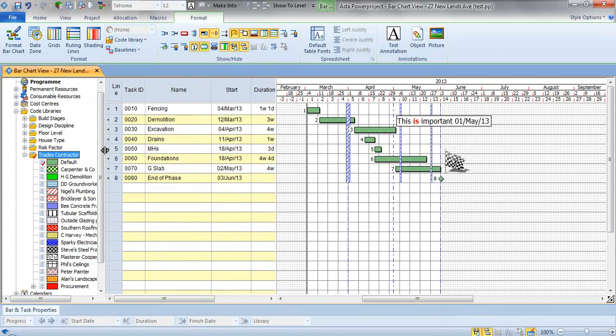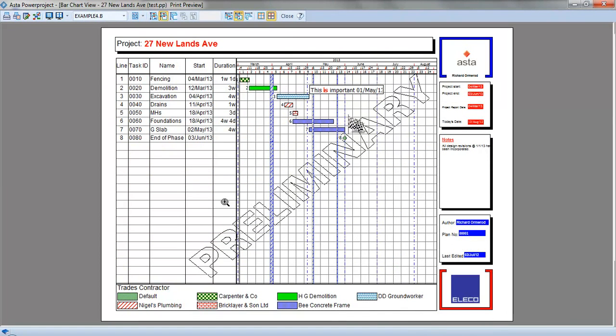So in this particular case we're not going to carry out the work ourselves, various other people are going to do it on our behalf, and we can take an organisation from this list where we've preset an appearance, and we can drag and drop it onto an activity, and then we can see visually, colourfully, which organisation these different activities are being carried out by. And we can either display that in a column on the body of the plan, we could put it as a text annotation after each activity, or we can select, in this case, more than one activity, and we can put a single code onto 2, and so we can see that appearance on screen, but later when we preview that or print it out, we can see that information presented.